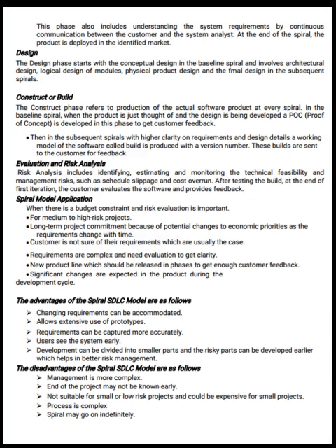Construct or build. The construct phase refers to the production of the actual software product at every spiral. In the baseline spiral, when the product is just thought of and the design is being developed, a POC, proof of concept, is developed in this phase to get customer feedback. Then in the subsequent spirals with higher clarity on requirements and design details, a working model of the software called build is produced with a version number. These builds are sent to the customer for feedback.